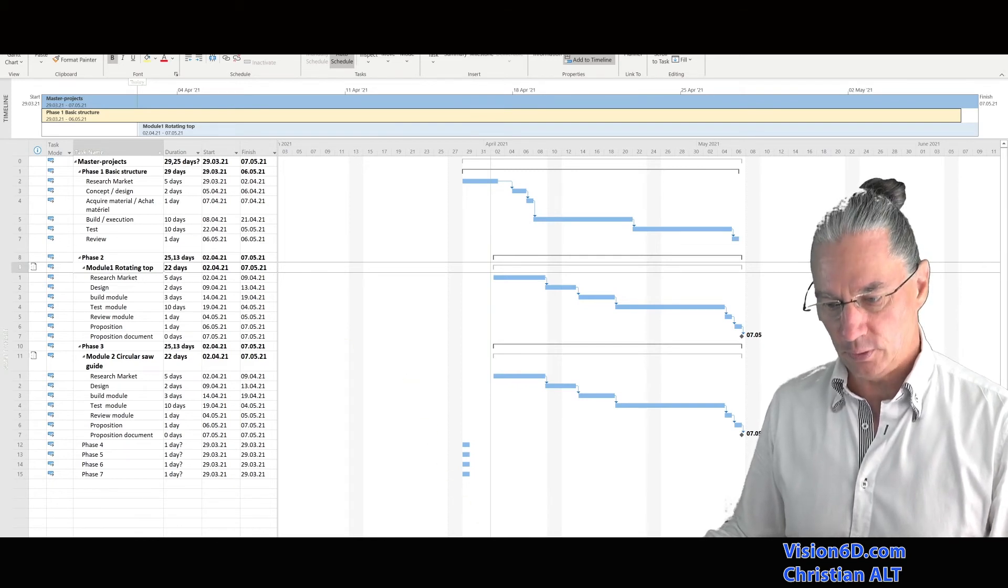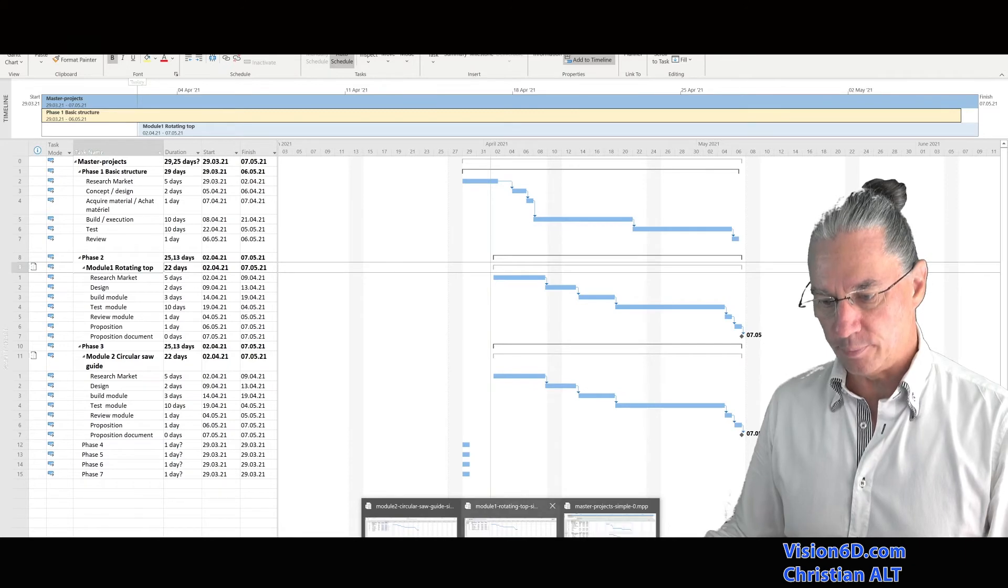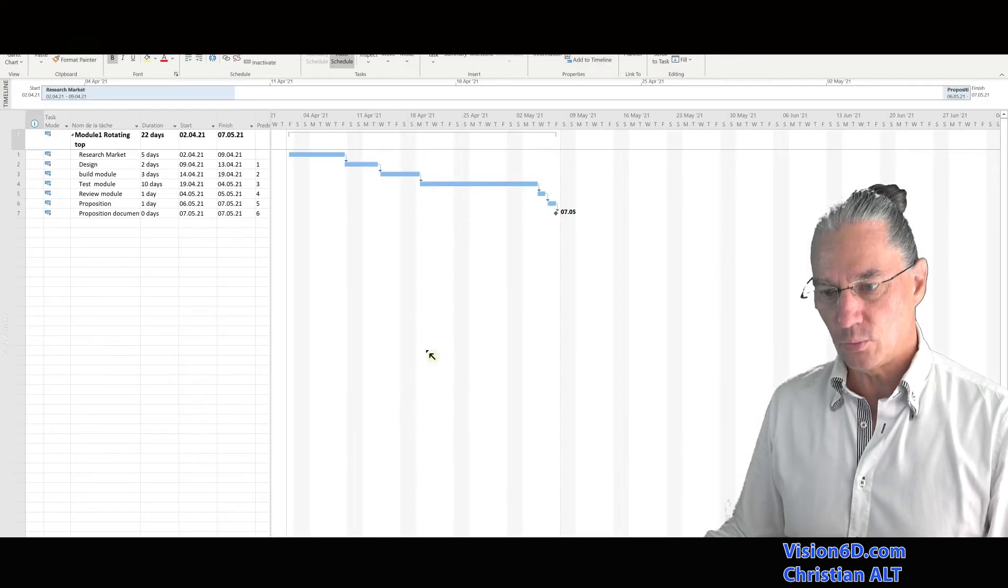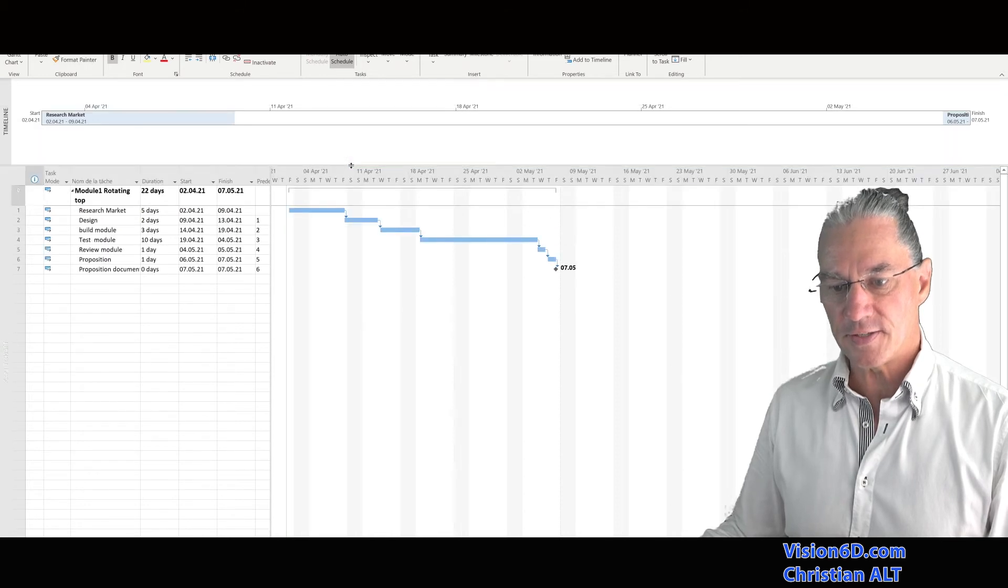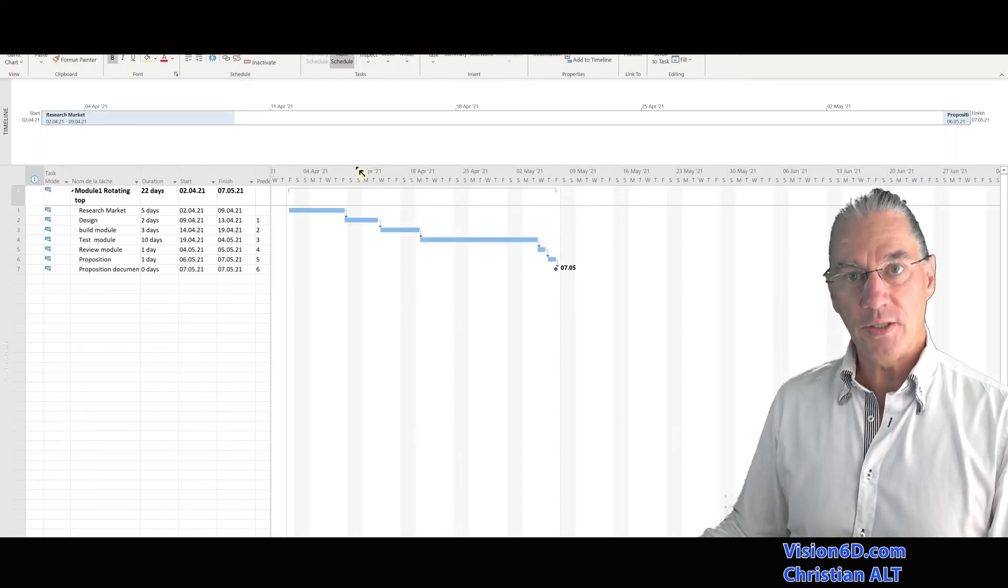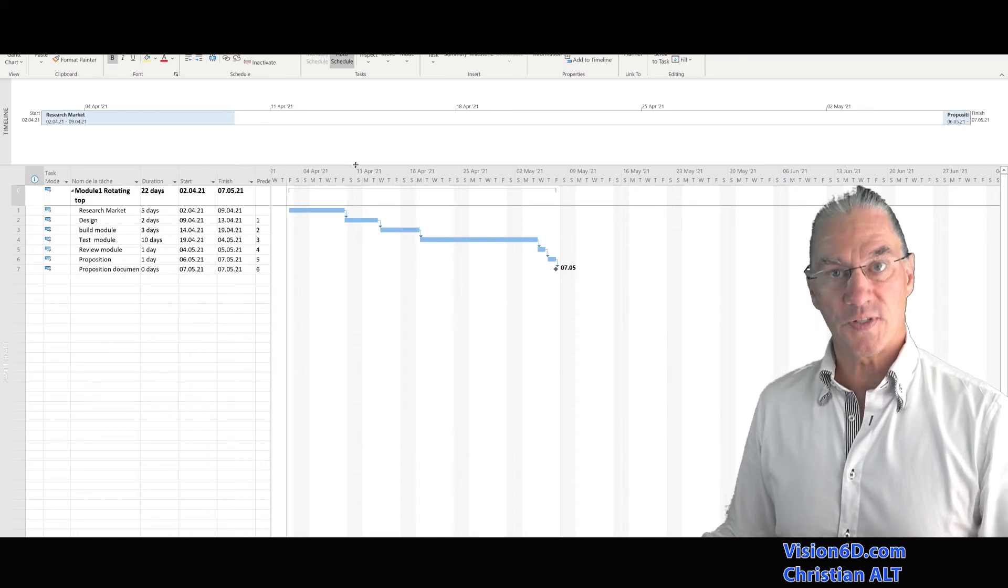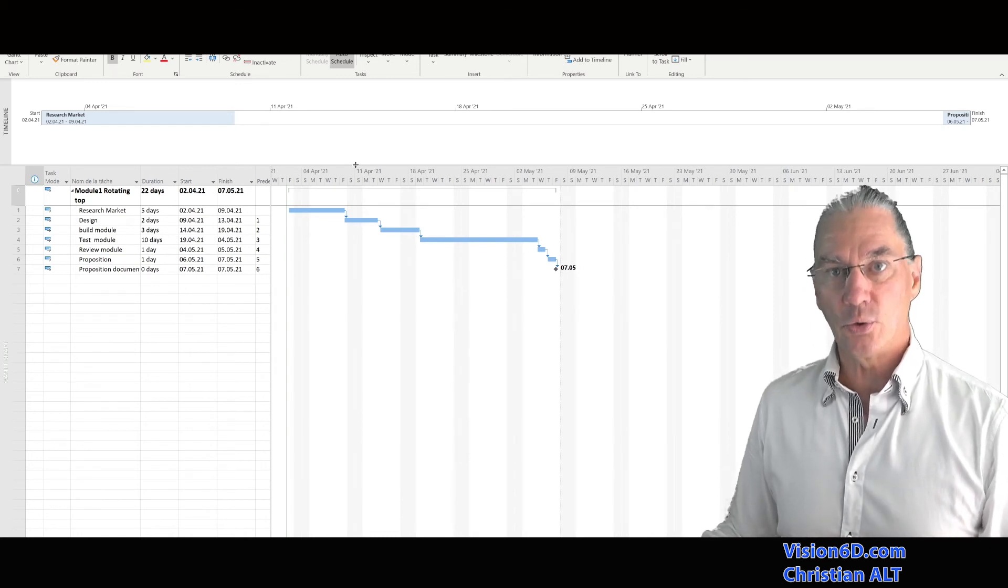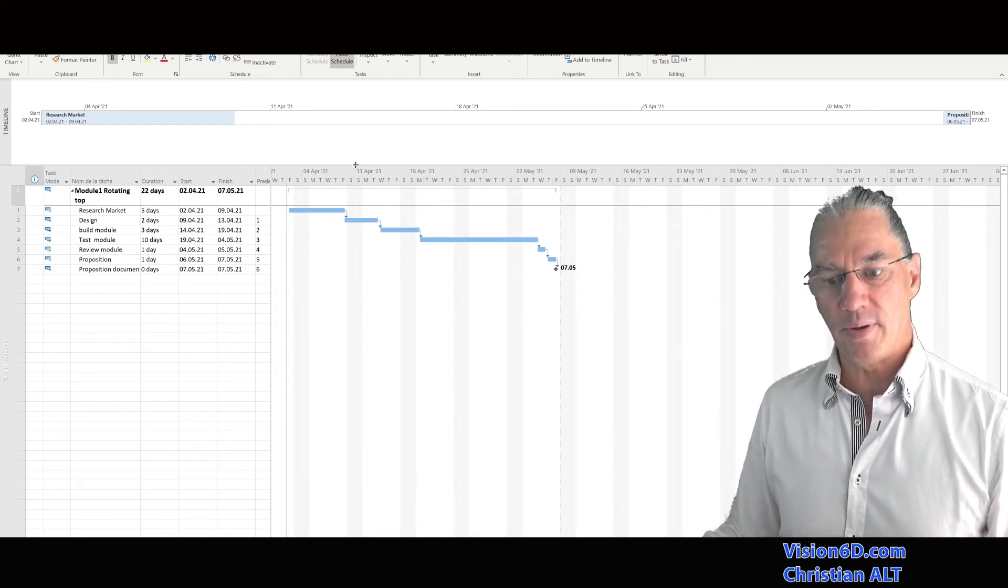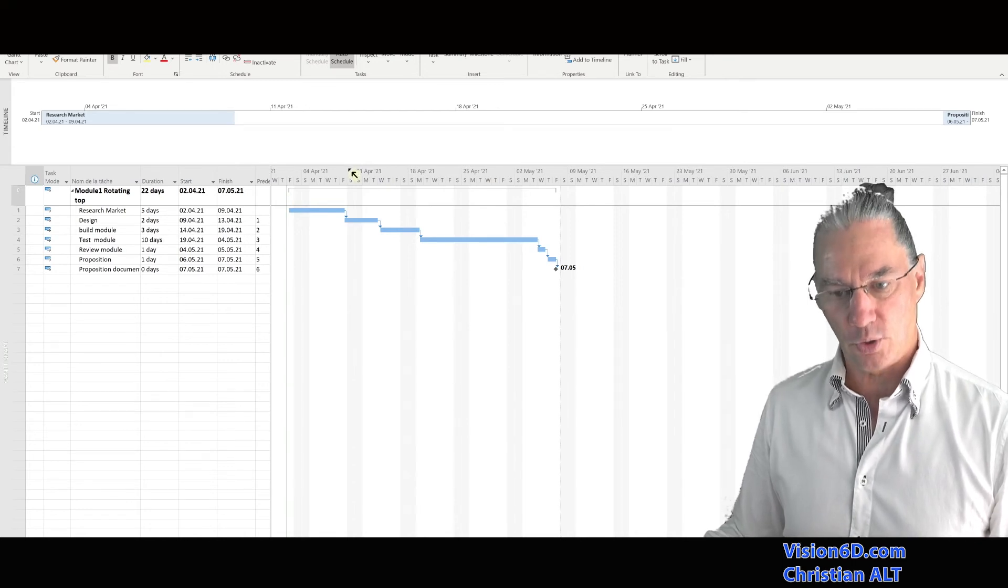For example, it's the module number one, which is here. And you see that the timeline there is empty. It means that the timeline from a sub-project is totally independent from the timeline in the master project.